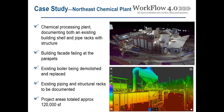The case study was a chemical processing plant with a series of different scopes of work under the same contract. One was to document an existing building shell — originally an early 1920s building that has evolved over the years, as manufacturing plants tend to do. They were also looking to document a series of pipe racks and structure along the site because they were doing a complete boiler replacement. Some of the site was being demolished, other pieces were going to remain, so they needed to know what was there to accommodate new additions to the piping and structure.